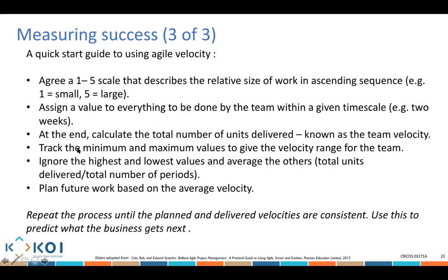And you're going to go and reduce the minimum velocity, remove it, or remove the maximum velocity. And then you go and calculate the average, and based on that average velocity, you know from there how long something will need to be completed. And this is what I've done.